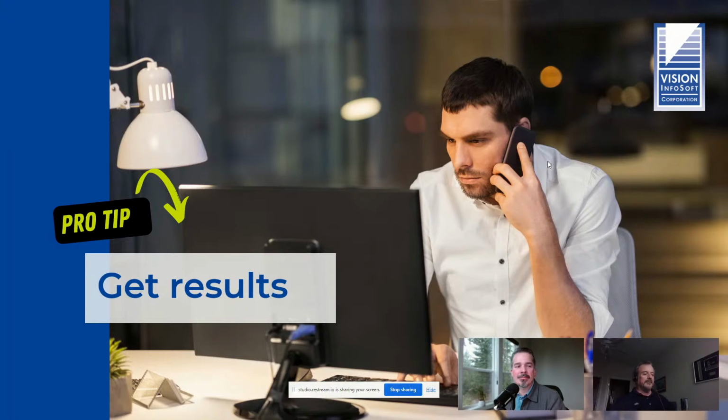Finally, get the results. If they tell you that you were not the winning bidder, then they have an obligation to tell you where your bid was, how many people bid it, and where your bid was between the lowest and the highest bid. They don't necessarily need to give you every other competitor's bid, but you need to know if you're bidding against 5 other people and you're always the fifth one, then that's not a good situation for you. You either need to consider changing your markup, getting better pricing from your suppliers, or more productivity in the field, or something. You certainly don't want to be the highest bidder rather than the lowest bidder on a job. But get the results.